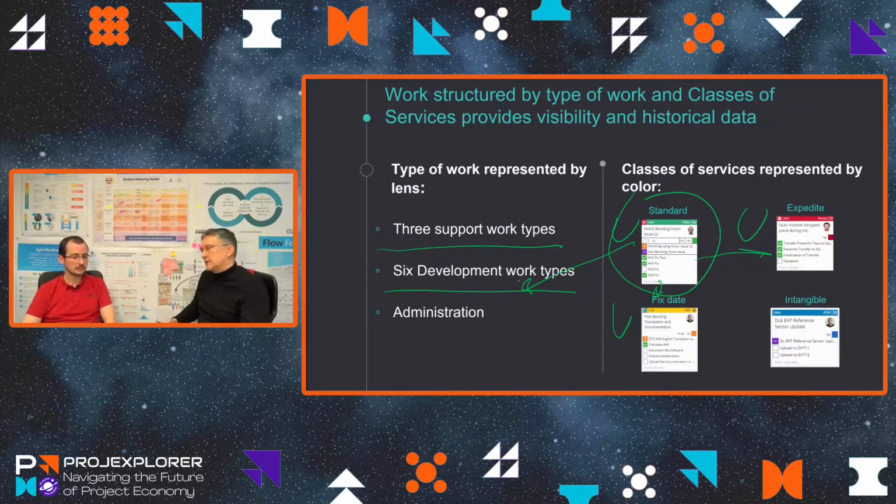In the standard task, normally, if you delay them, you pay some cost, but it would be proportional to the time. In the expedite tasks, how does it work? Usually it is exponentially costs more. So if you delay it more, it will cost much more for the company. From there comes the hurry, the ASAP mode of work for expedite tasks.